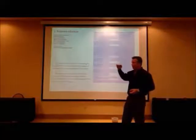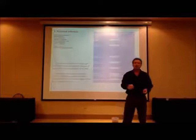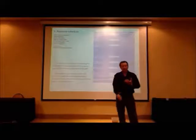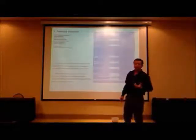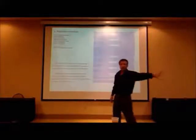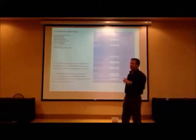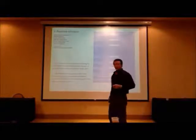If all the draws are equal, and they're drawing that project out way too long, and you got 35 days of penalties from going overboard, and he's still got to put in the appliances, and he's still got to do this, there's a good chance that contractor's just not going to finish. He's going to say, you know what, keep that 4th draw, it's not worth it, and he's going to walk away. So you always have to make that last draw extremely important. Make that much bigger than the rest of the draws.